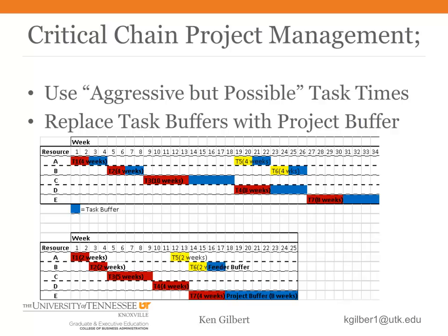Third, we no longer view the task completion times as milestones. We have intentionally set very aggressive times that we will meet or beat half the time, and we will fail to meet the other half of the time. These task completion times should be viewed as handoffs in a relay. Complete the task as quickly as possible and turn it over to the next step. As the task may take more than the time allocated, that is what the buffer associated with the project is for, is to absorb that.